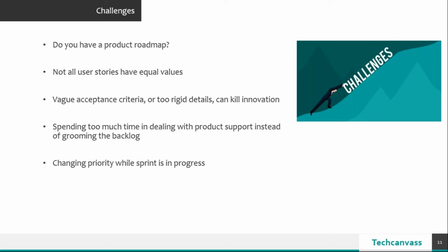So to avoid it, as a product owner, when you're writing user stories, try and follow the INVEST criteria. The I for INVEST stands for independent. Ensure that when you write stories, these are independent enough, so no two stories are dependent on one another. The N here is negotiable, because requirements keep changing.